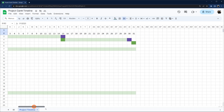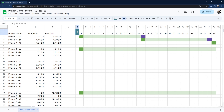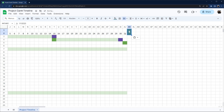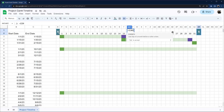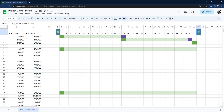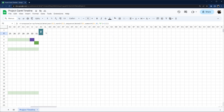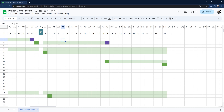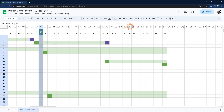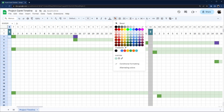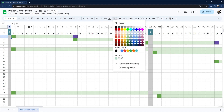Now we have our month and you can see it populates all the way across. We can copy and paste this formula for the next month — we want it to reference EOMONTH plus one to get the next month start. So now we have February. We can take that same formula and copy it again, and we're seeing this come together. Let's add some gray highlighting to show unused columns, above the blue row there.